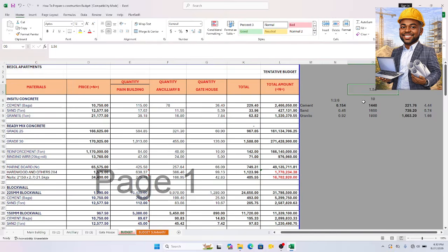All right. So that is what we have here. So 1/10 times the bulking factor, or times the volume of dry weight. That's what you see here, 1/10 times 1.54, that's why you have 0.154, or 0.15 in 2 decimal places as you want.